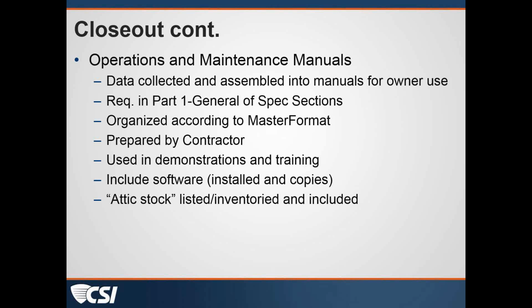Now, what that means to me, in this situation, was if I knew that the contractor had to shift the storm sewer line over 3 feet because it conflicted with a duct bank, I needed to look at his record drawings to see that he marked that up. If he hadn't done that, I needed to point it out to him and get him to do that before I'd sign off on that pay app. Does that make sense? If not, we'd welcome a follow-up question.